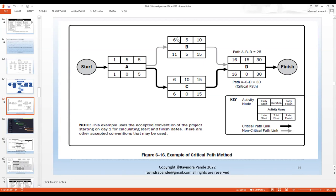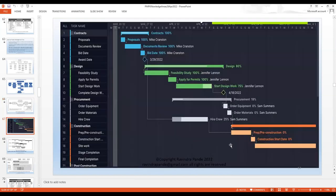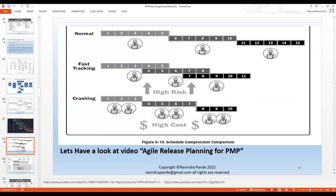Then we have Late Start and Late Finish, and we calculate the Total Float and duration based on the overall sequencing of tasks. Here we can clearly understand how much a task can be delayed at its maximum and how early a task can be completed. This slide gives us a clear view of the Precedence Diagramming Method. I'll share the video for PDM again so that any challenges in planning or denoting critical tasks on your project plan can be addressed.